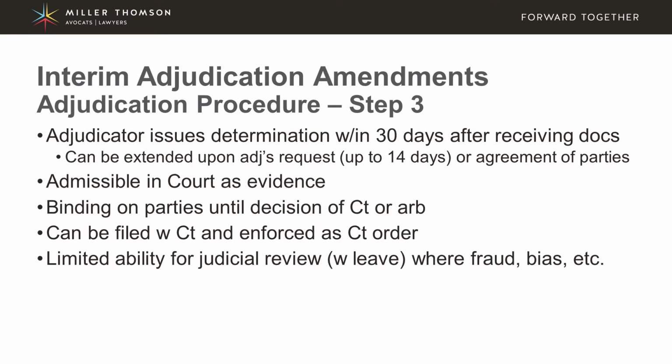Now, the third step of the adjudication process is that the adjudicator is required to make the determination regarding the dispute within 30 days of receiving the documents. Now, this 30-day time period can be extended up to 14 days if the adjudicator requests an extension, or it can be extended upon agreement of the parties for any length of time.